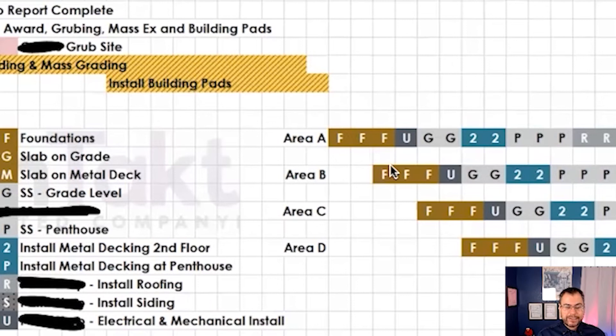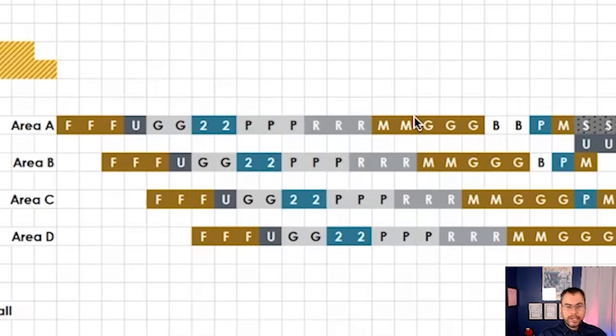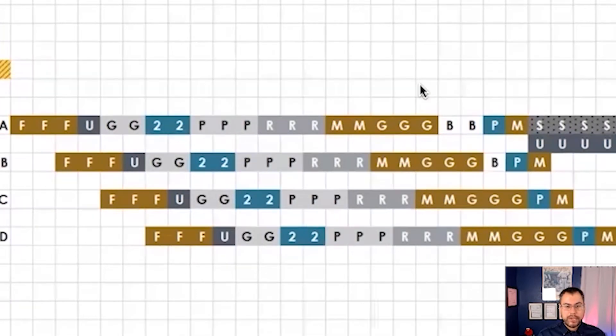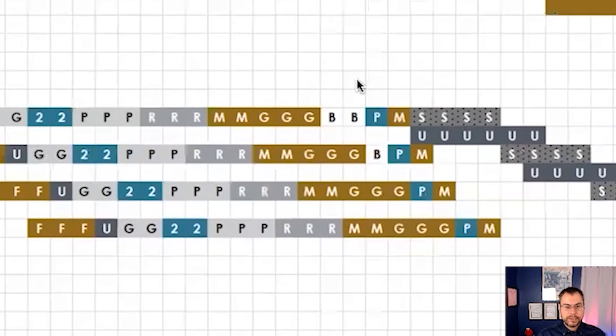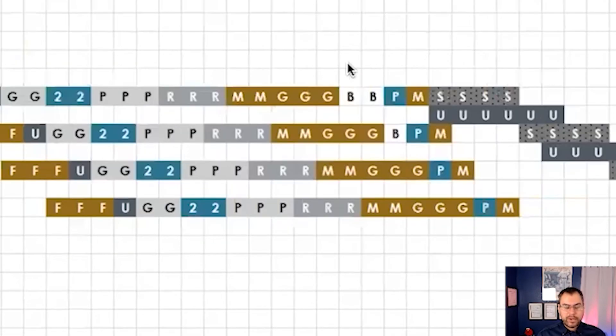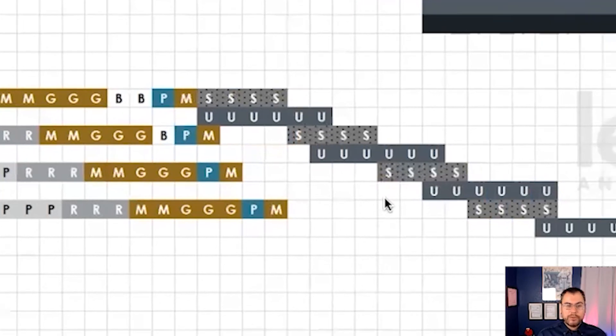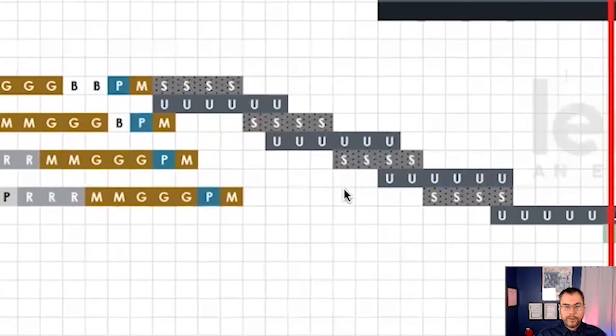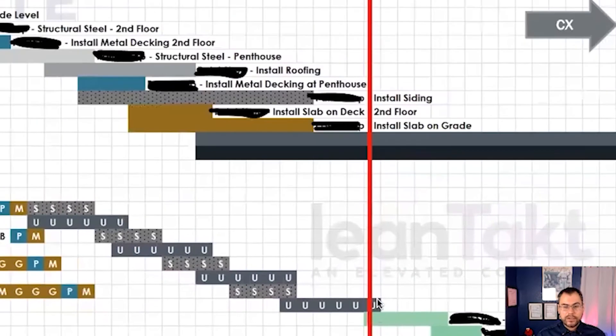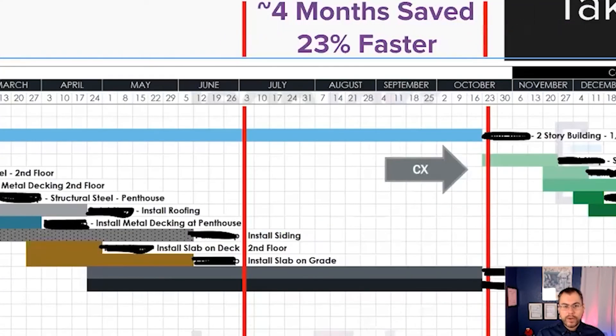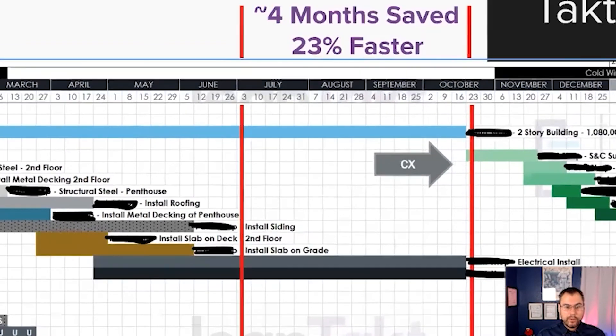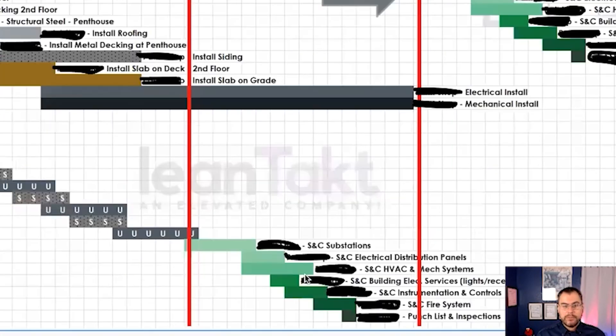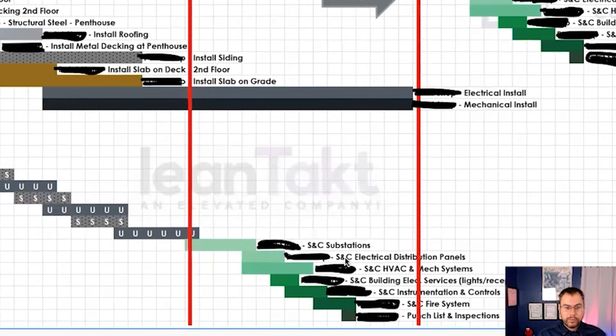Once we start the foundation work, they stay on site all the way to the end. They go to work on other buildings on this very large campus. They come back to pick up the slab on metal deck. And then the slab on grade is the last thing that happens based on the constraints of this engineering design requires. We've got a couple of days of buffer, and then we come into the siding, which is what this S represents, wrapping around the building and following these four different areas. And remember, this is just a first pass schedule. And then we finish here and start commissioning four months faster. That's 23% faster. And this was just a first pass schedule for one building.